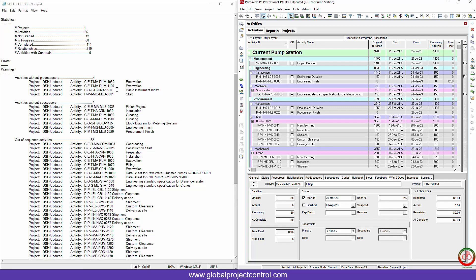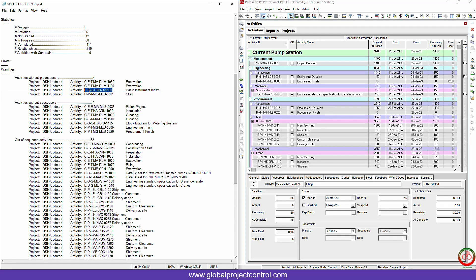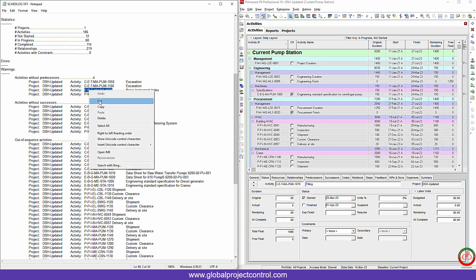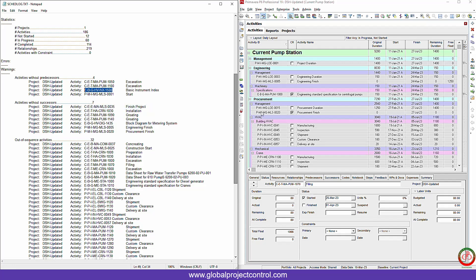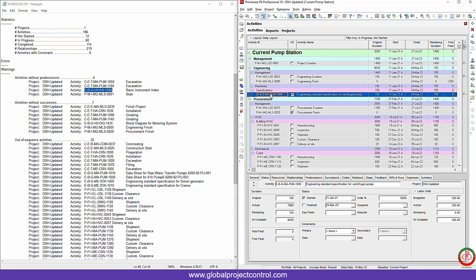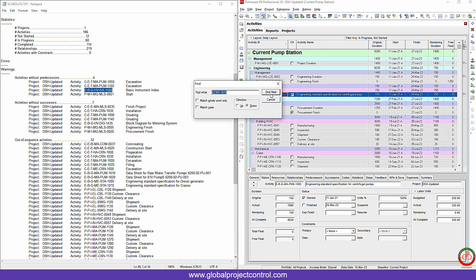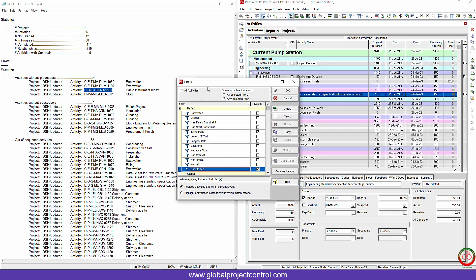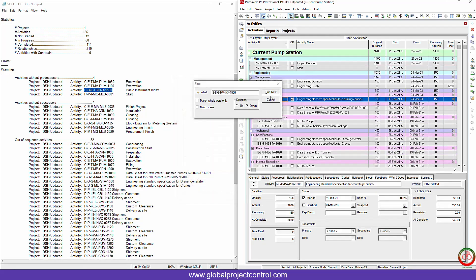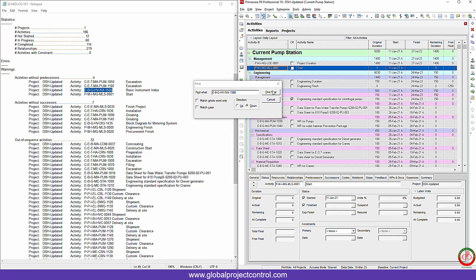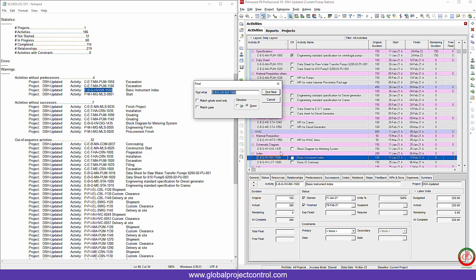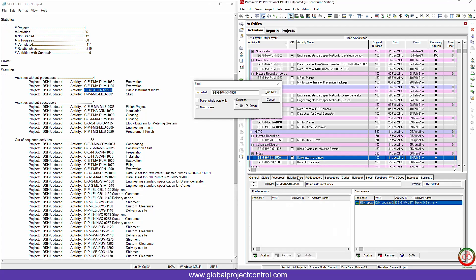For instance, if I want to check it: basic instrument index. Is it really predecessor free? Let me press ctrl F and I try to find it. Here it is. Basic instrument index. If I go to the relationship, you will see that I don't have any predecessor for this activity. So I need to fix it.